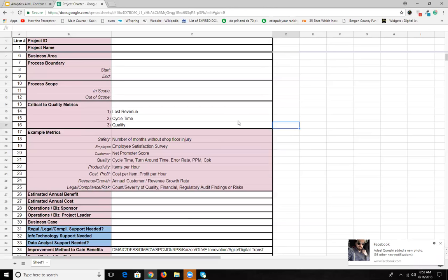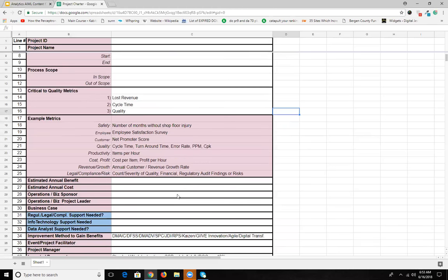From that, we can then calculate our benefits and our costs, right? So if we're losing, say, 20% of our sales, then we know the estimated benefit of this project would be a 20% improvement in revenue. We make some estimate about how we could reduce the wasted materials and labor, and that might represent another 12 or 15%. So we would take 12 or 15% of our labor, multiply that out, and put the dollar value in that particular row. And then we want to make sure we identify our project leader, our sponsors, go through as part of our business case.